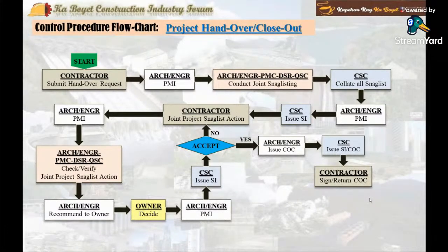Then, the contractor authorized signatory signs the COC, retains one copy of the COC, and transmits back to the consultant the COC signed by the contractor authorized signatory.